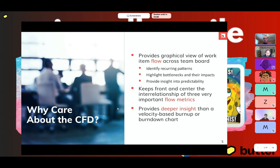A CFD can help us identify recurring patterns or bottlenecks, and even help with predictability. It also keeps front and center three important flow metrics. A lot of people don't necessarily realize that a CFD has embedded within it three flow metrics. I'm also a strong believer that a CFD is probably better than your typical burndown chart, your velocity-based burn up or burn down chart.